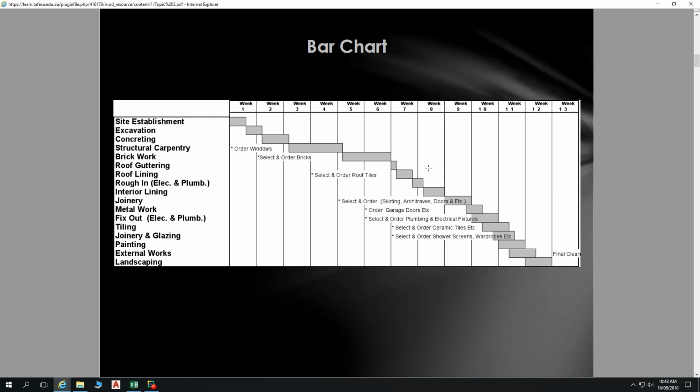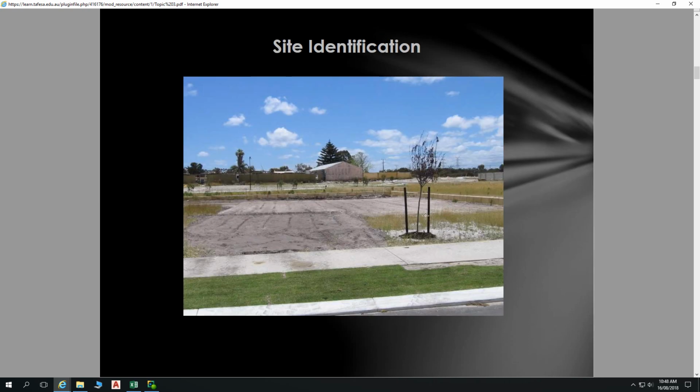So you do that walkthrough, and quite often at that stage the bank valuer will come in after that and see all the red stickers and go, oh yeah, there's still some issues yet. Let's hold off on that final piece of funding before it's all signed off. And so that's some extra motivation there for the builder to rectify any of those issues promptly.